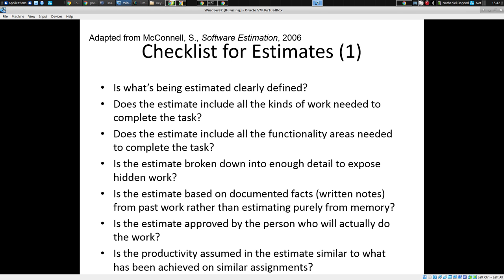You have to think mechanistically about what are the pieces that are going to go into this? Not just the artifacts, but what steps do you need to go through to bring it together? And then to be asking, how long will this take or that one? And that forces you to engage at a very concrete level of thinking. Like, who's doing it? How up to speed are they? What tools do they need? Do we have those tools in hand? What has to be fixed to let them go forward, et cetera?